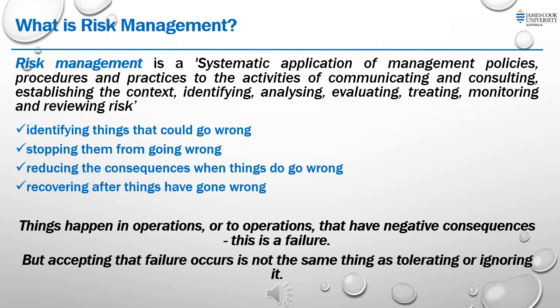The risk management process typically involves a couple of process steps, or we can identify four of them. The first step is risk identification. This involves identifying potential risks that may impact an organization activities or objective. This can be done through various methods such as risk assessment, brainstorming sessions, and reviewing past incidents. The second one is risk assessment. This involves evaluating the likelihood and potential impact of identified risk. This can be done through various risk analysis techniques such as risk scoring, risk matrices, and also Monte Carlo simulation.